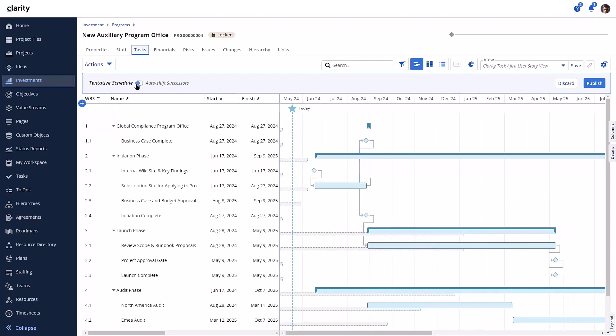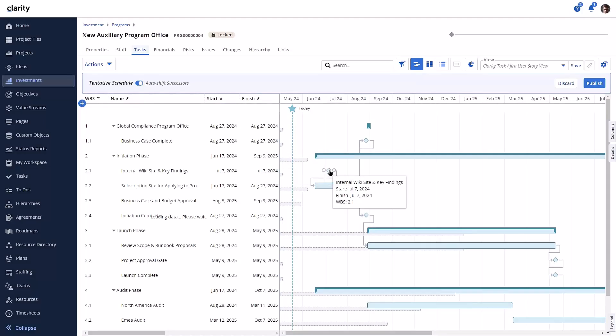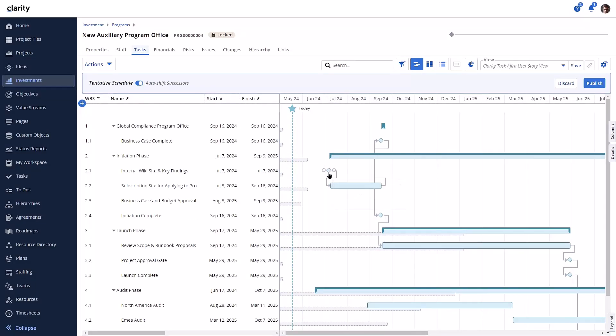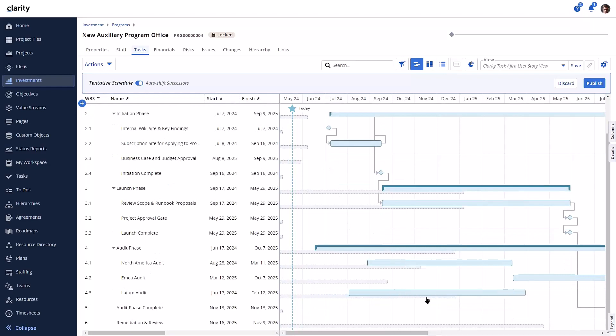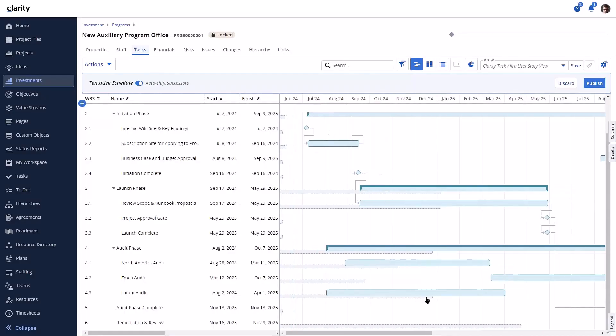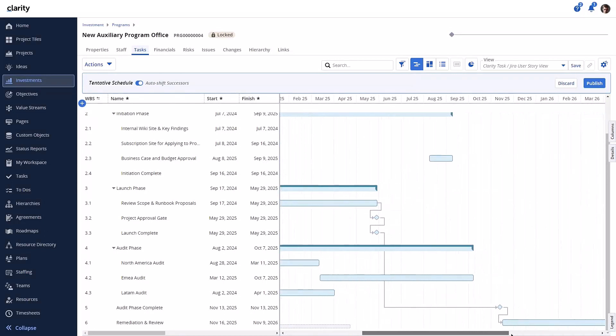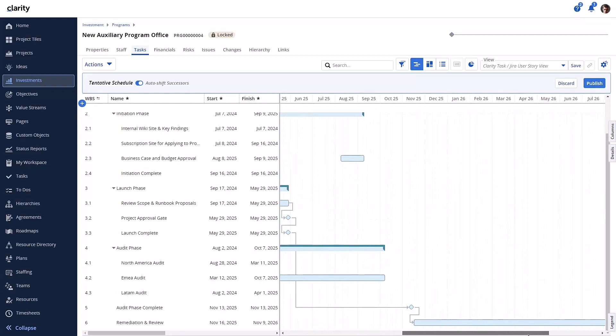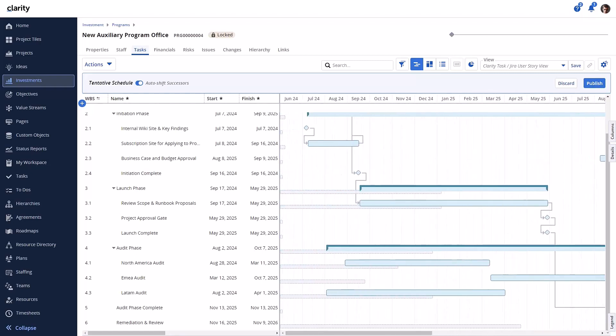For example, enabling the Auto-Shift successors and moving a task that has a successor task will move these tasks a specific number of days. If the schedule is acceptable, the manager can publish the changes.